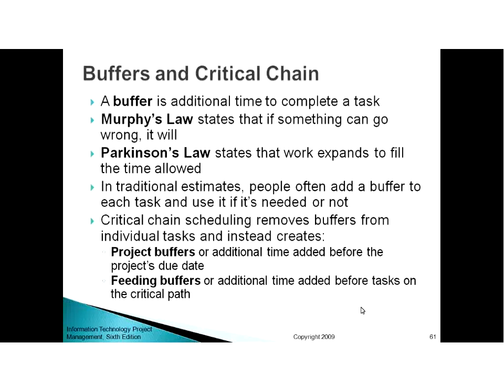In traditional estimates, people often add a buffer to each task and use it whether it's needed or not. Like if an activity requires 2 days and you are asked how much time it is going to take, you will tell 3 days. So what you have done is you have placed a buffer of 1 day with you, that in case you get sick, or in case you don't feel like working efficiently, or in case you work slowly, you will be completing it in 3 days for sure. So this is an individual buffer you have kept for yourself. You may be able to complete it in 2 days if that was 2 days work, but you will say 3 days. And that's a very usual approach, that people add a buffer with each task for themselves.